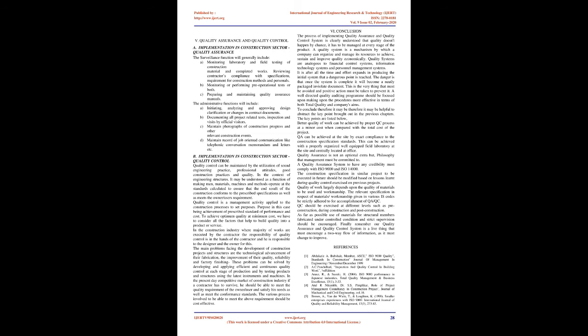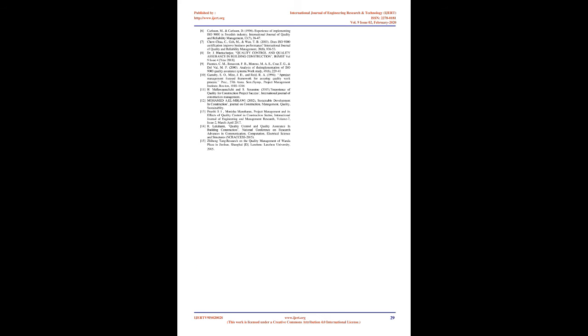The administrative functions will include: A) Initiating, analyzing, and approving design clarification or changes in contract documents. B) Documenting all project-related tests, inspection, and visits by official visitors. C) Maintaining photographs of construction progress and other relevant construction events. D) Maintaining record of job-oriented communication like telephonic conversation, memorandum, and letters, etc.